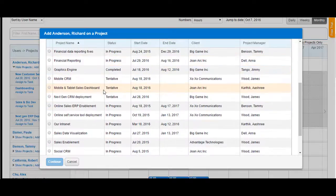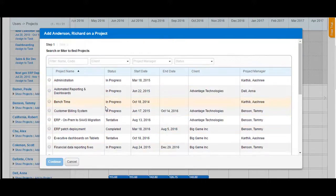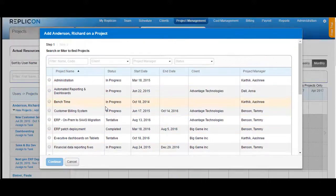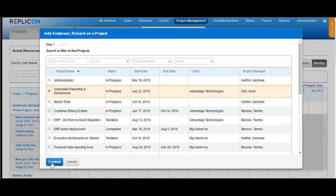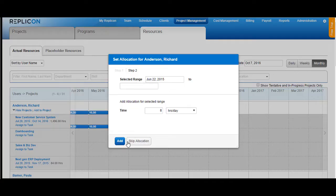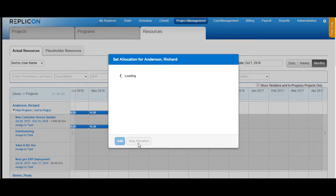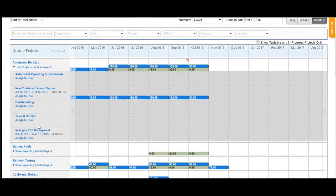This will show you the name of all the projects that the user has not been assigned to. Choose one of those projects and click on Continue. Now you can allocate the number of hours to the user. If you click on Skip Allocation, the project would be added to the list but no allocation will be done.